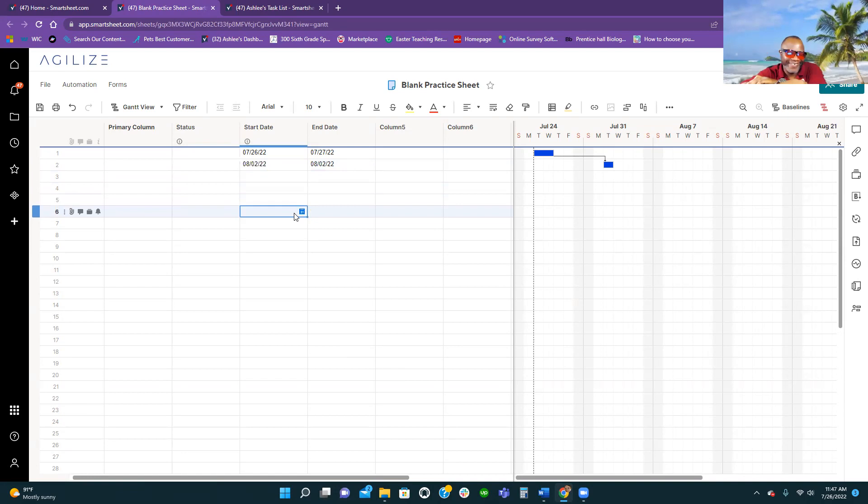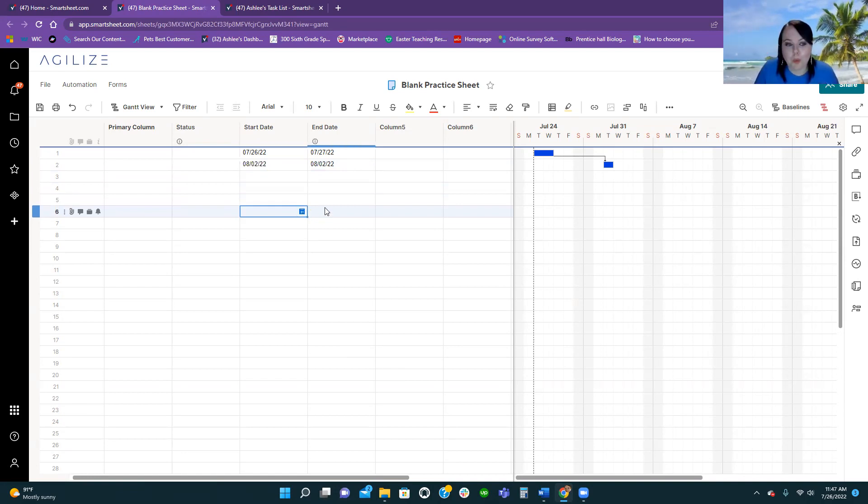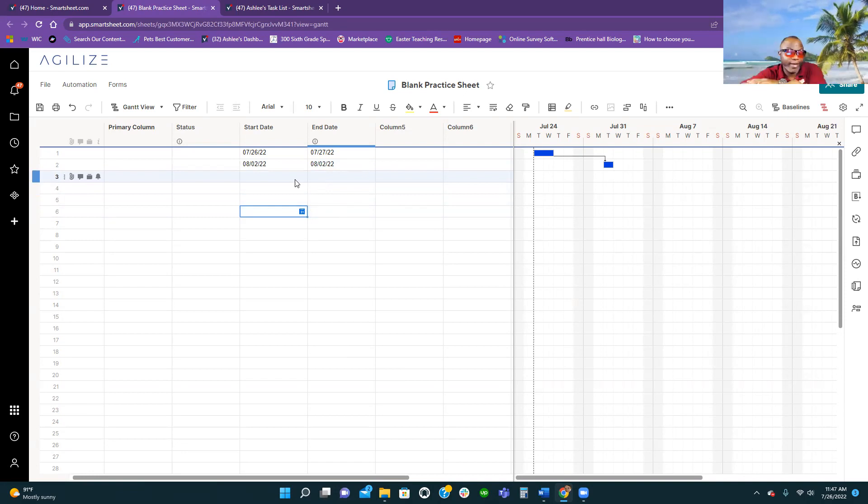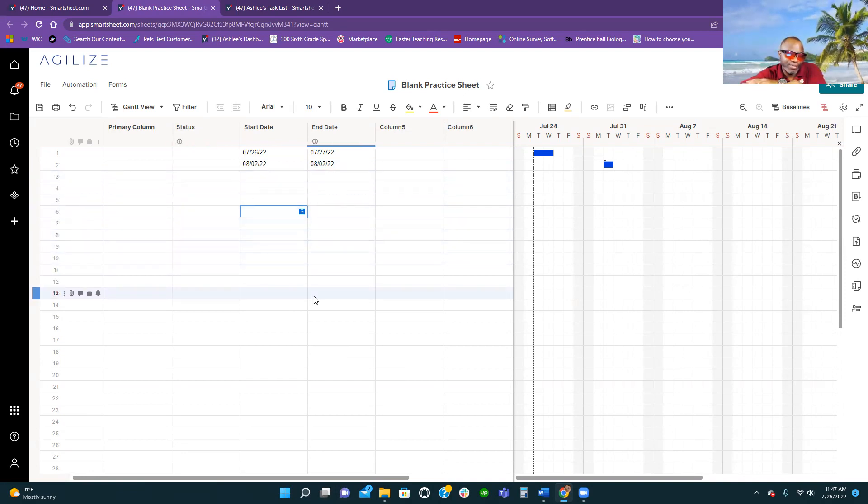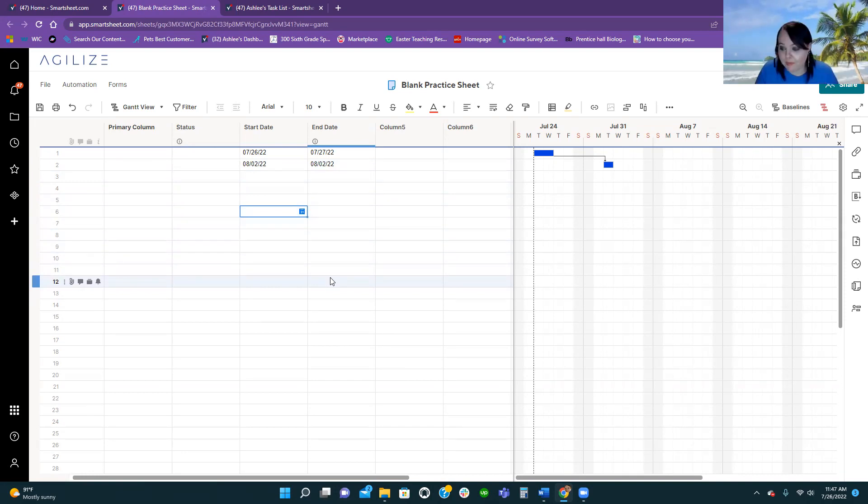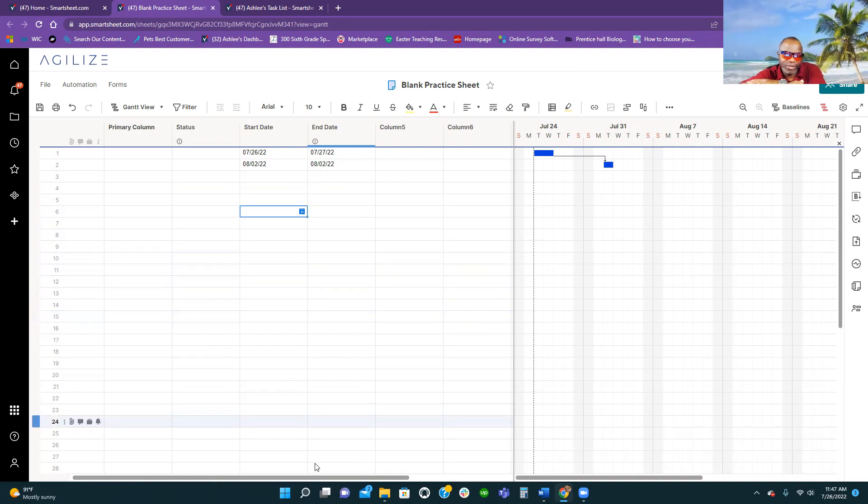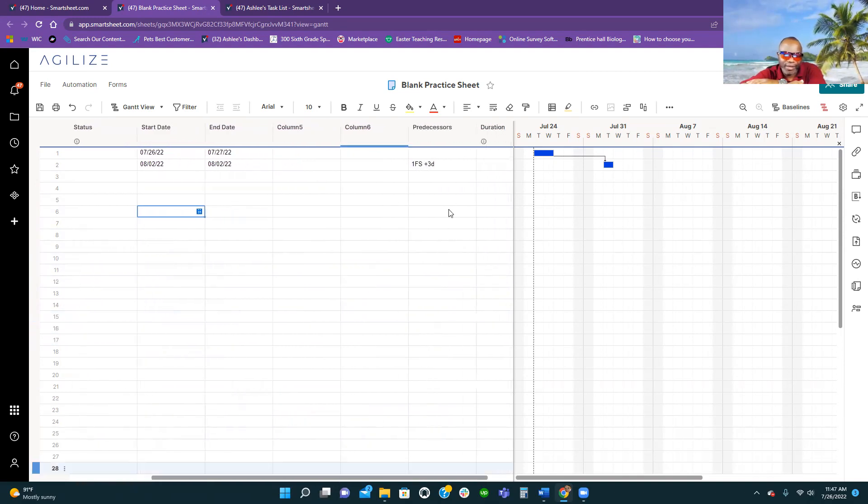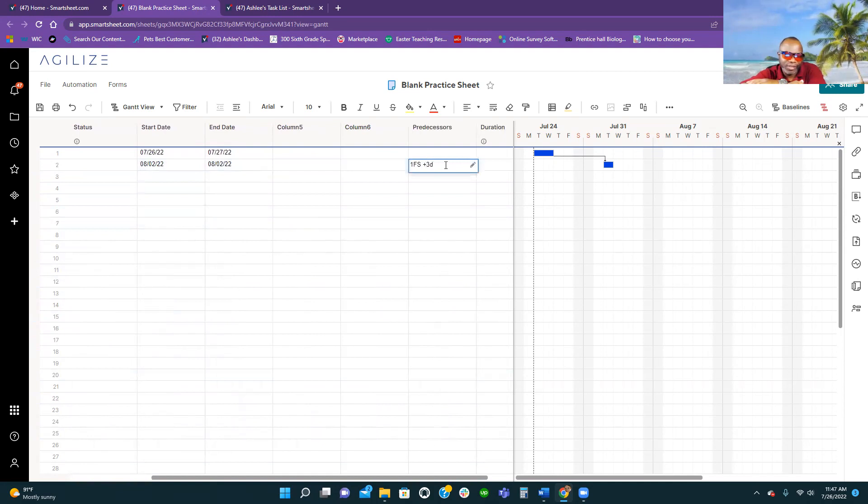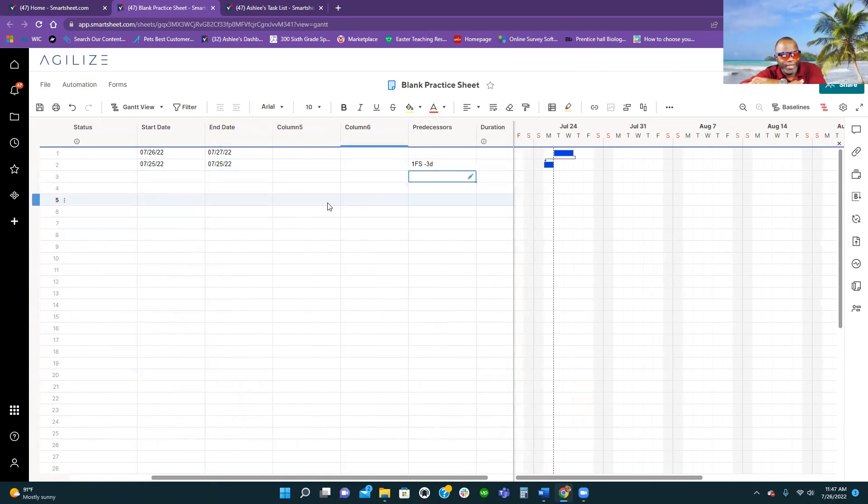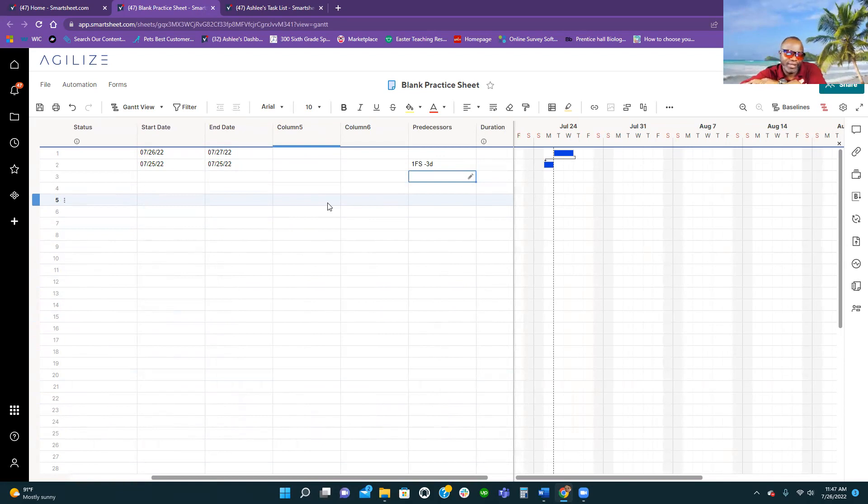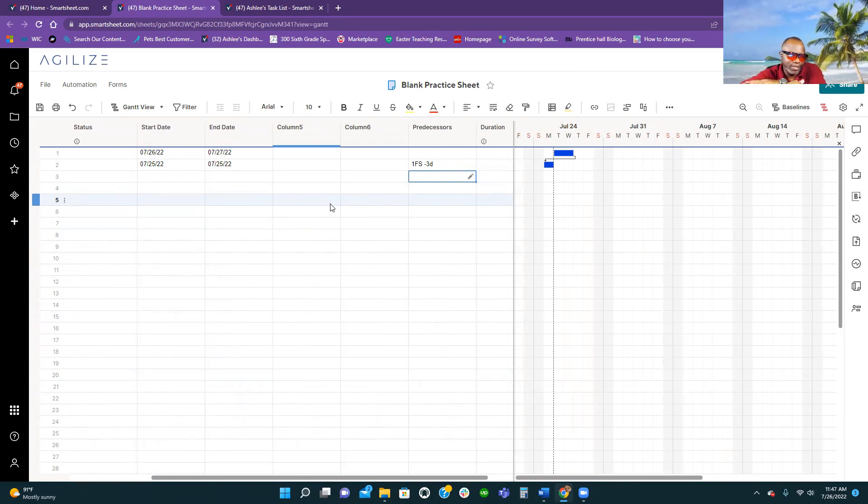So this is so much more smart. Yeah, it is very smart. And for the friends who are watching in project management space, what Ashley just demonstrated was lag time. And you can also do the same for lead time. You could do a minus amount of number for it to show you some lead time. So for those who are really into their Microsoft projects and stuff, you can do the same thing right here in Smartsheet.